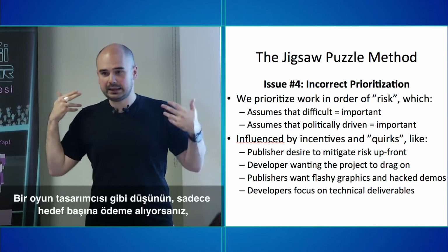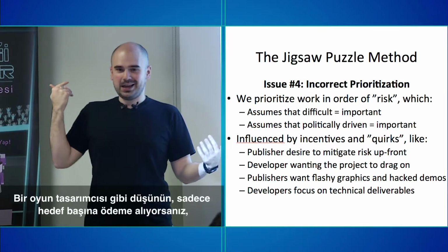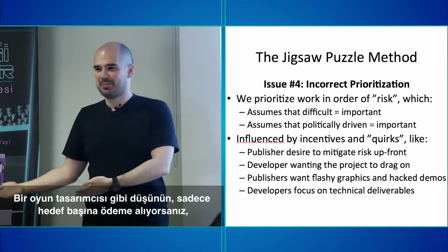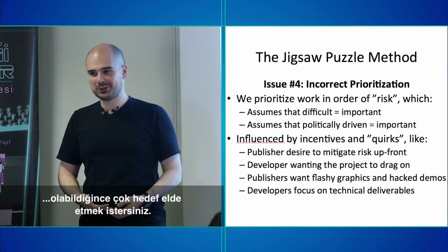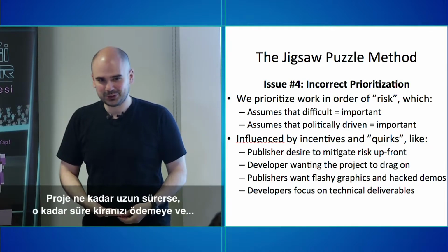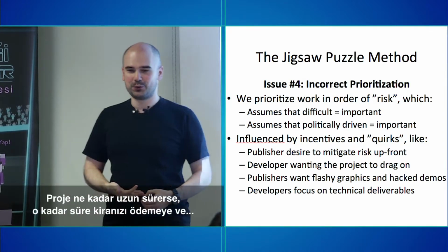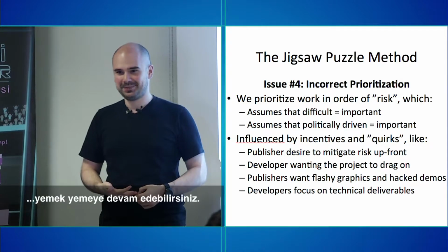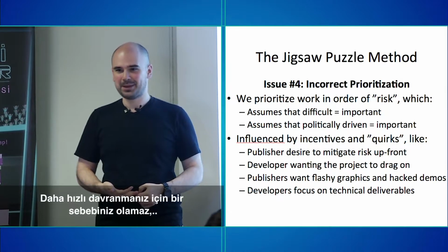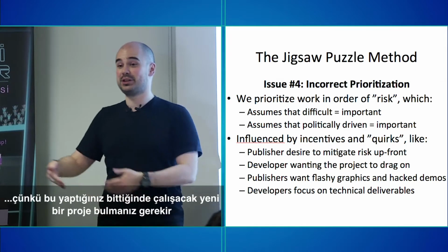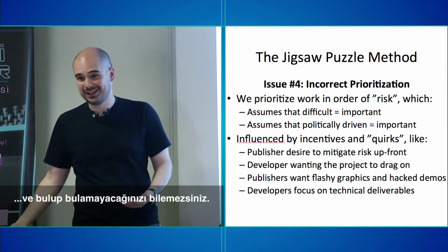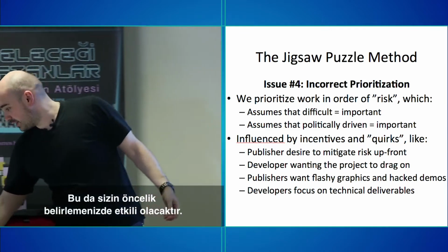So think like a game designer. If the only way you get paid is through milestone payments, you're going to want to get as many milestone payments as possible. So the longer the project goes on for, the longer you can pay rent and eat, right? There is no incentive for you to be done fast with the project, because then you need to find a new one and you don't know if you will. That's going to affect the prioritization.